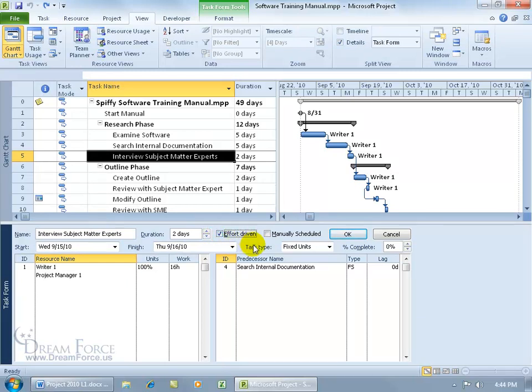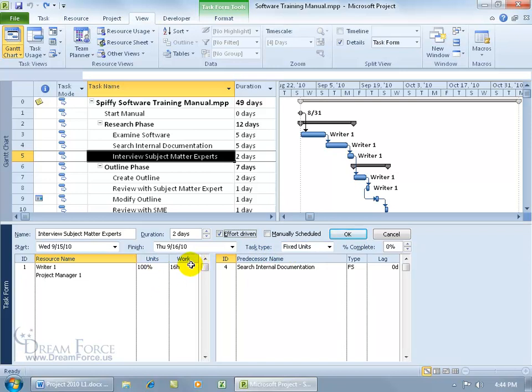Now effort driven works with the task type fixed units. In other words, it will cut the amount of time or effort it takes to complete the task, but because it's fixed units it won't cut the units. In other words, assigning additional resources with the task type fixed units will split the work between the two resources.